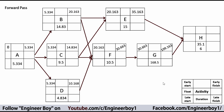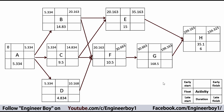Activity H has two predecessors, and we take the maximum — the early finish of activity G, which is 199.163. Add the duration of H to get the early finish of H. Now for the backward pass, the early finish and late finish of activity H are the same. Subtract the duration to get the late start, which is 199.